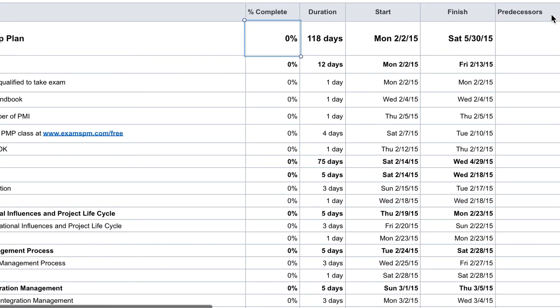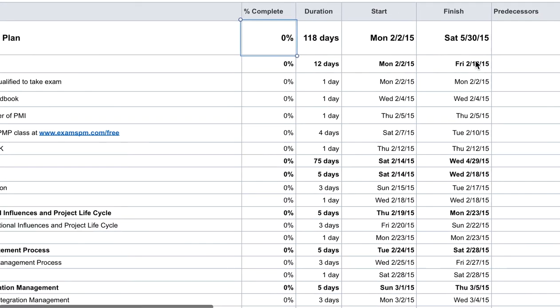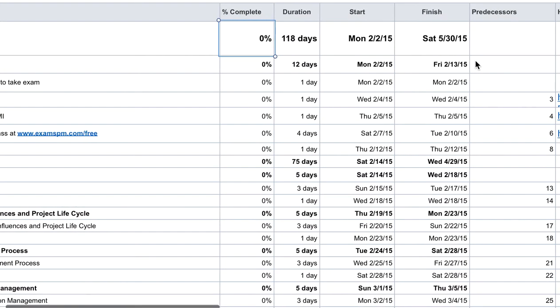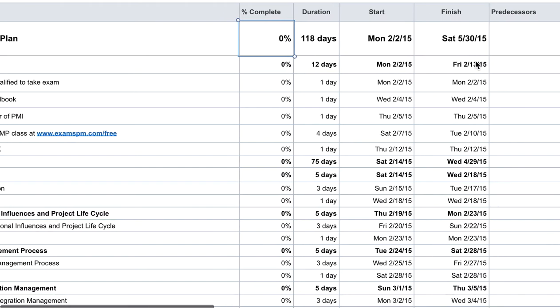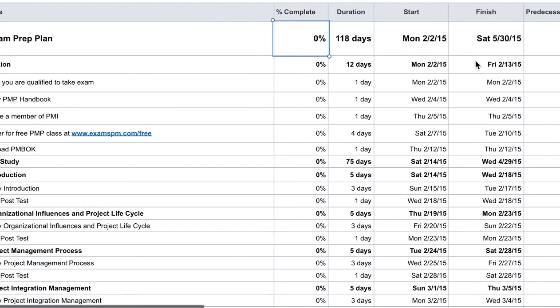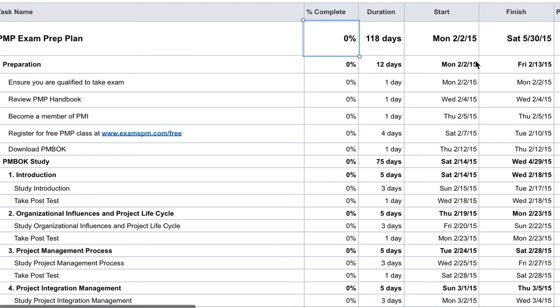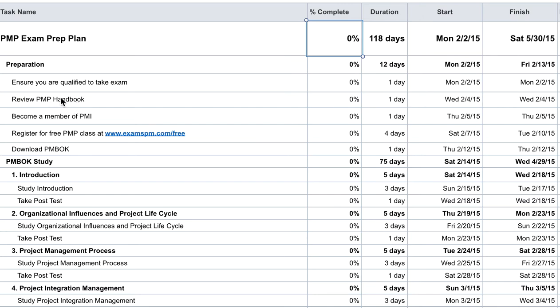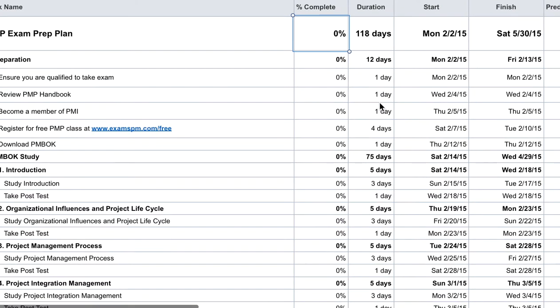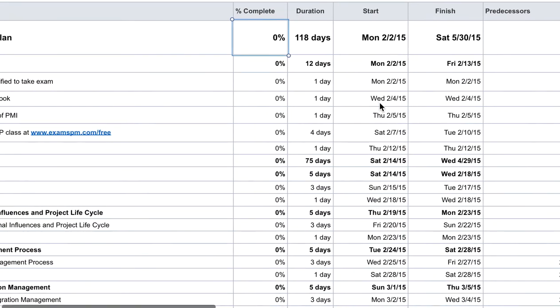You can have a predecessor column, which means which task would follow which task. A predecessor is a task that must be completed before the following task can start, so you can build in those logics. It will automatically help you plan out the start and finish date. So let's say you know this task has to start after the first task here, and if I just write my predecessor over here, then Microsoft Project would know that the start date of this task will have to be after the finish date of this task.